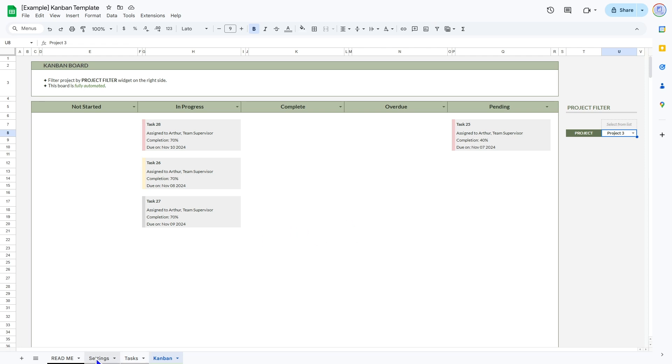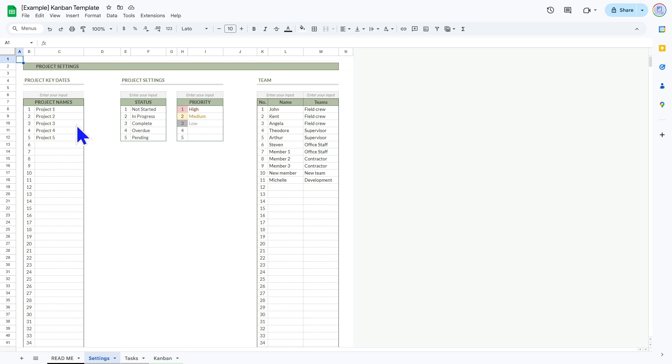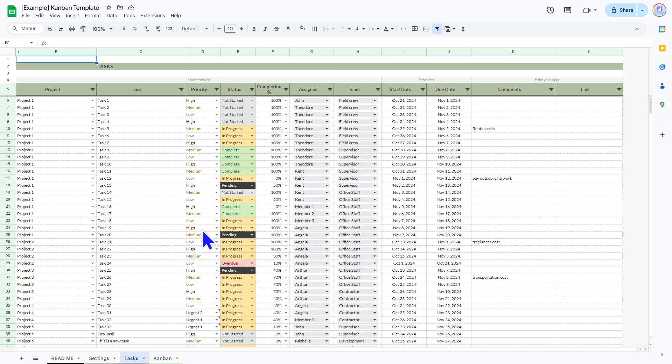So once you download our template, you go ahead and fill in all your project parameters in your settings. The status will become the name of the columns, the priority levels and your teammates. Fill in your tasks on our simple project management spreadsheet.